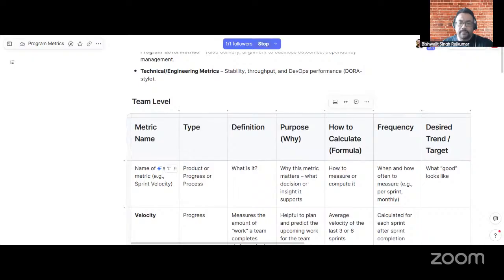It says cycle time measures how long it takes for work to move from in progress to done state. So it is giving the efficiency of the process, so that the work will move from one state to another. Not the actual work picking up from the to-do list to in progress.